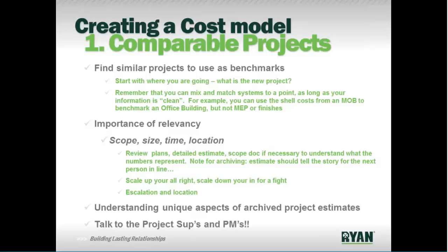And so as ENR tracks monthly a bucket of materials and labor and those costs, they create a percentage that we use and we spread across all our projects. The thing to recognize in all of our templates and tools that are available that deal with escalation is it takes the macro percentage and spreads it across.